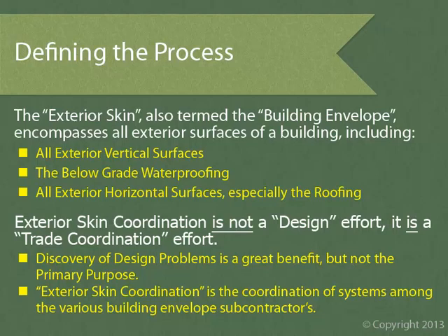During the general contractor's submittal reviews, they should be thoroughly reviewing each subcontractor's work, which is great, but it's missing one thing. During the submittal process, we tend to have tunnel vision on each subcontractor's individual and independent scope of work. And that's where exterior skin coordination comes in.